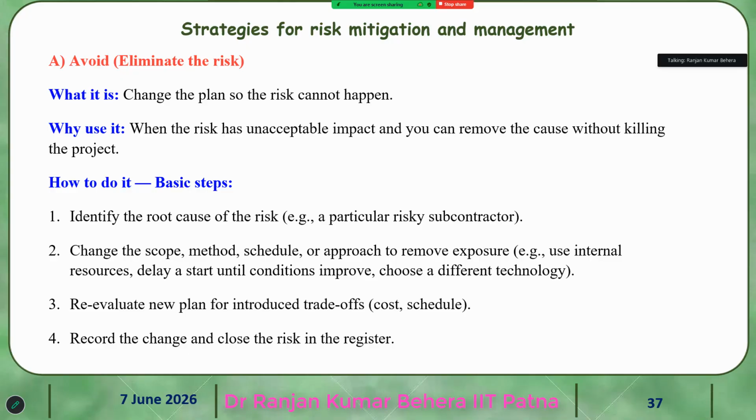Then re-evaluate the new plan for introduced trade-offs, that is cost and scheduling, etc. Then record the change and close the risk in the risk register.